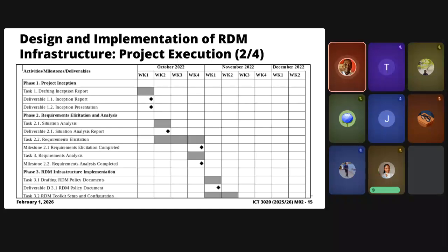So if you're looking at a deliverable, the date indicates when you're going to deliver that product, whereas a milestone is like a key event in your timeline, and it indicates when that event is going to take place. So duration is always 0, right? Whereas for these other tasks, the start date is different from the end date. The start date and the end date are the same for a deliverable and a milestone. And we'll discuss those things a bit more here.